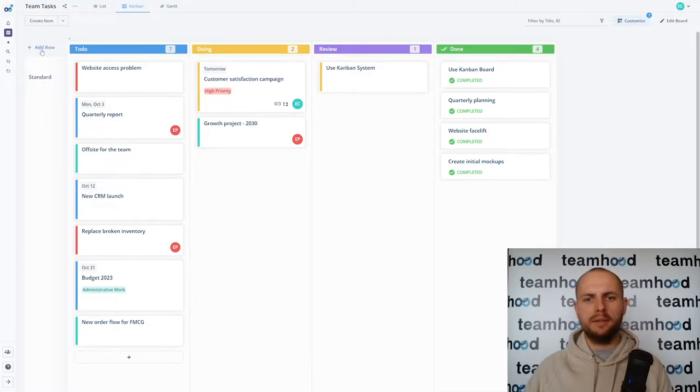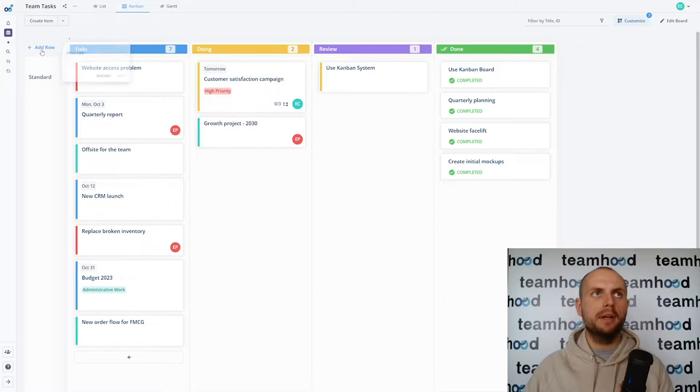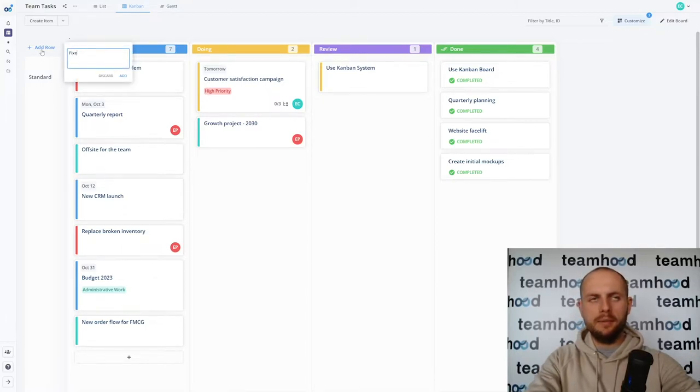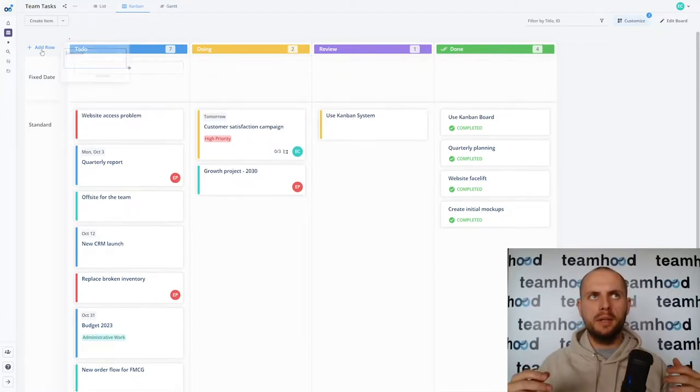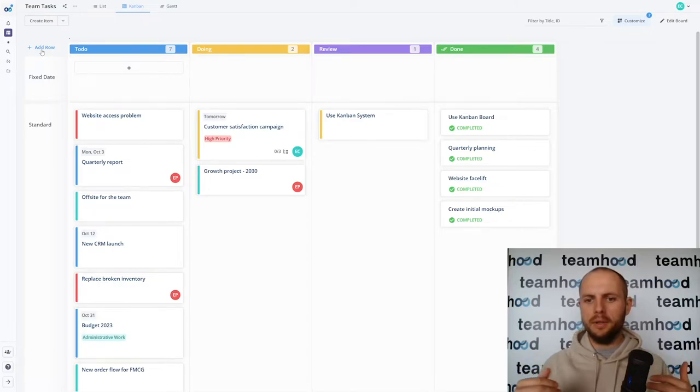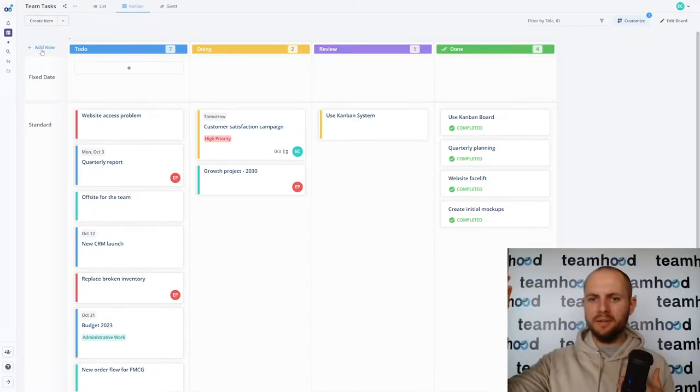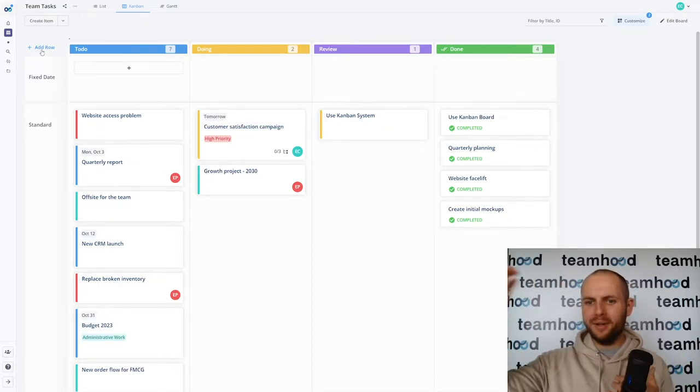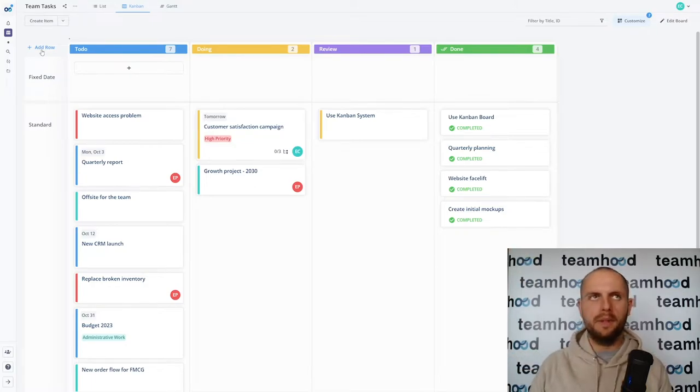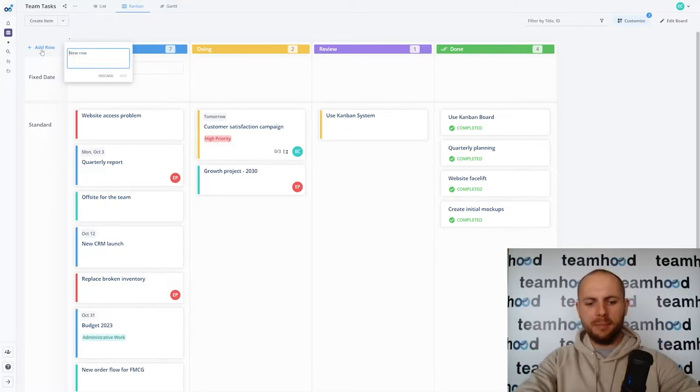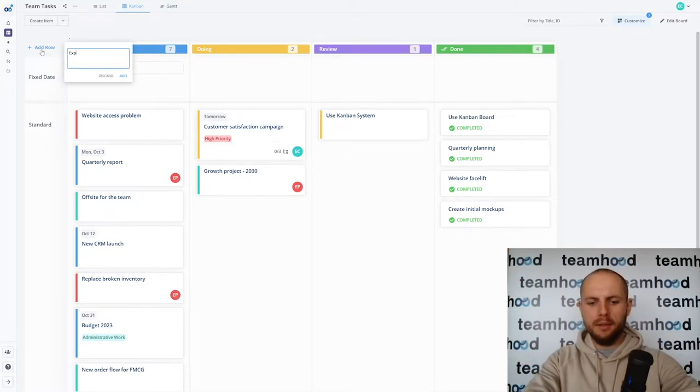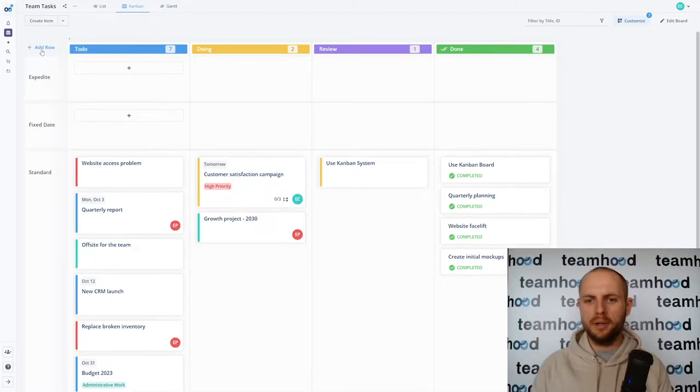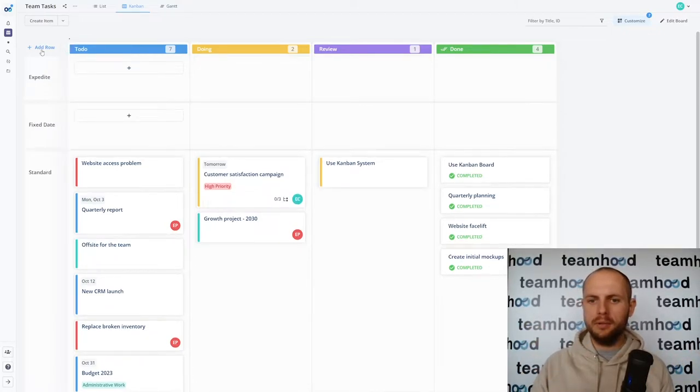Then there are two additional classes of service by default. One is called fixed date and it means the closer the deadline the more value we lose. When we reach the deadline if we're not done we lose a lot of value.